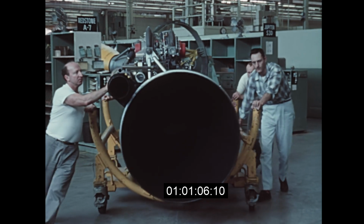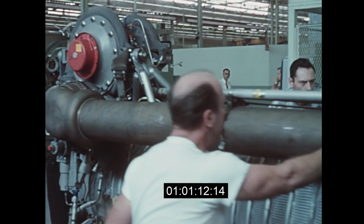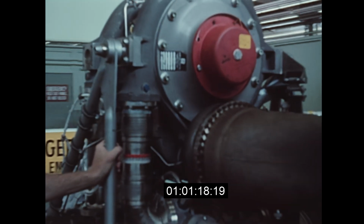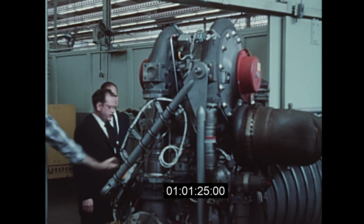During the first phase of Saturn engine development, 5 research and development engines for testing at Rocketdyne and 9 evaluation engines for the Army Ballistic Missile Agency will be produced. This effort is directed toward a static firing of 8 clustered engines anticipated for December 1959.